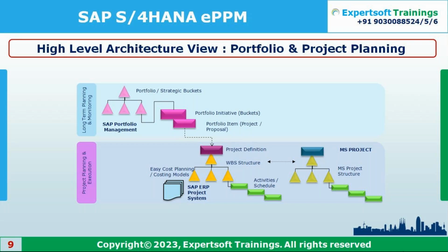I see you are saying that MS Project can be integrated to ePPM. Is that a one-time integration, or can you continuously integrate, as the project can be maintained in MS Project by some manager, and this can be fed on a regular basis to this module? I mean synchronization of the data. Yes, that is what we can do through ECP connectors, synchronize.